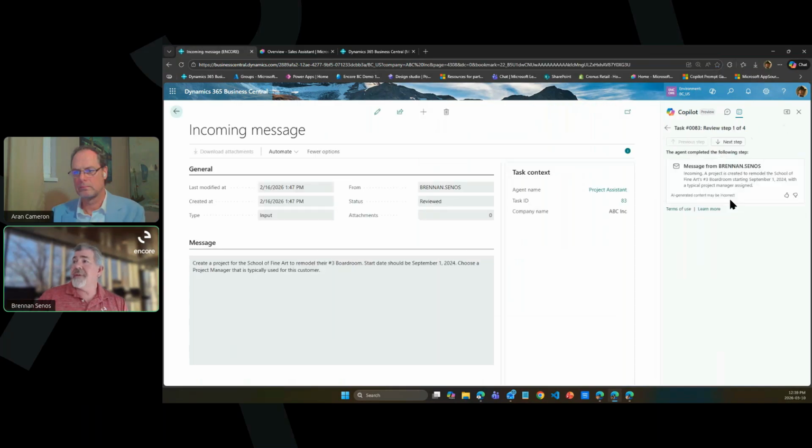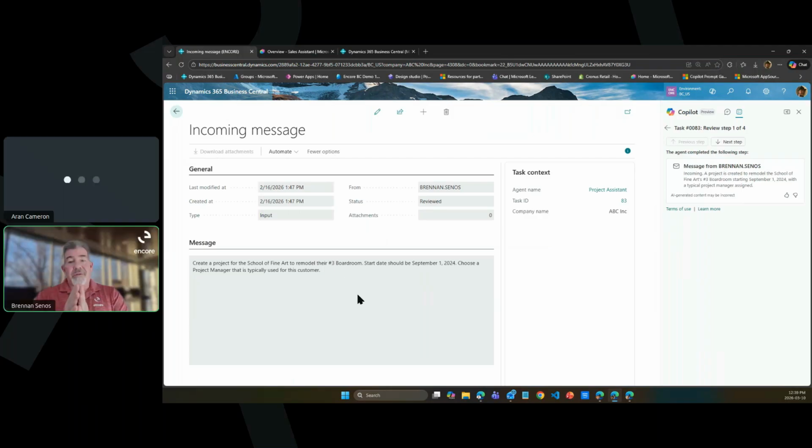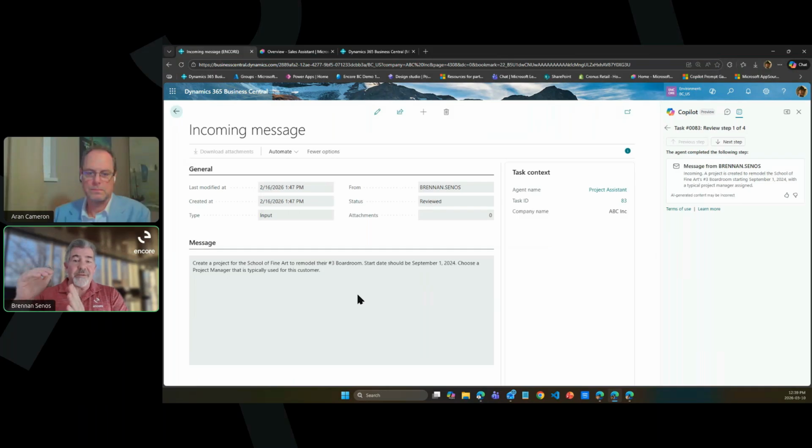The input that I had to provide, it's going to go and create a project with phases and tasks in Business Central based on the previous history for this customer and how we've set up projects before, and the description that I give, as well as a start date and who the project manager should be.